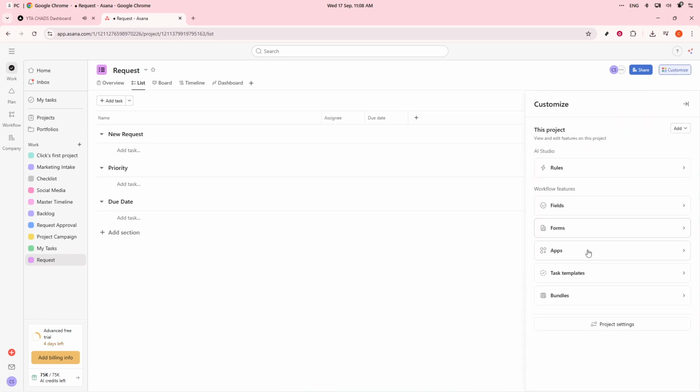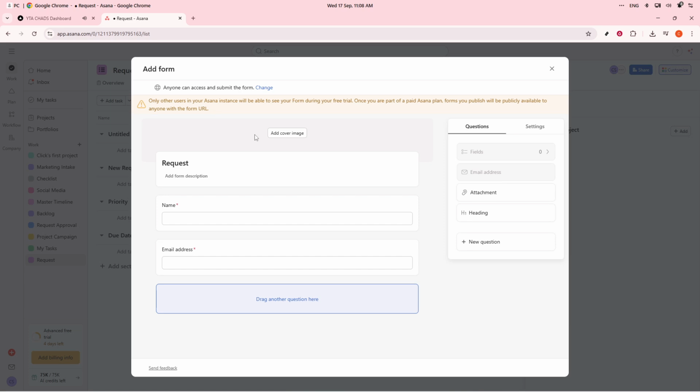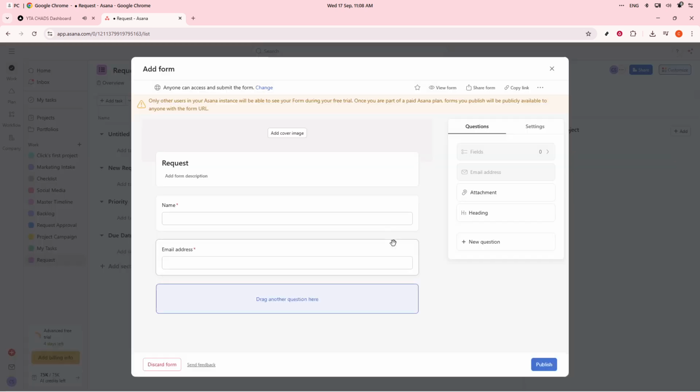To further streamline your workflow, we'll automate task assignments and routing using Asana rules. These rules can designate specific tasks to certain individuals, such as an intake manager, and auto-move tasks to the under review section when they're first submitted.